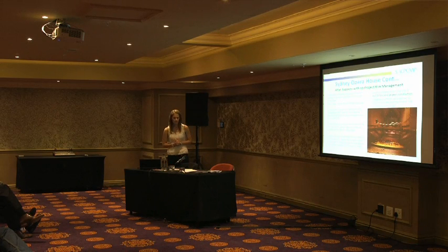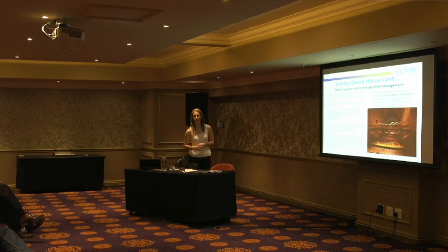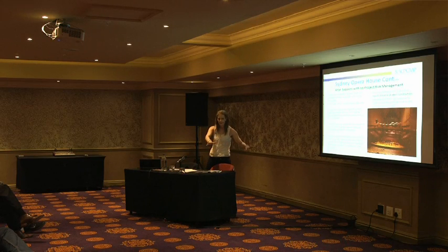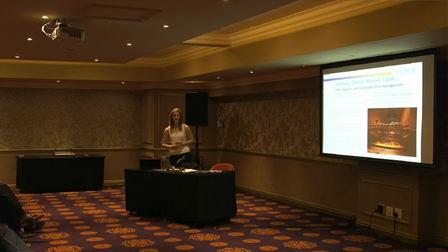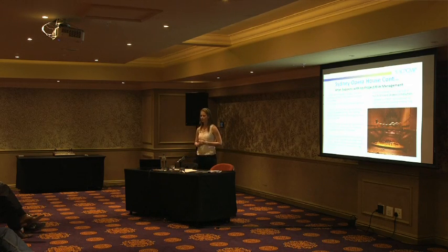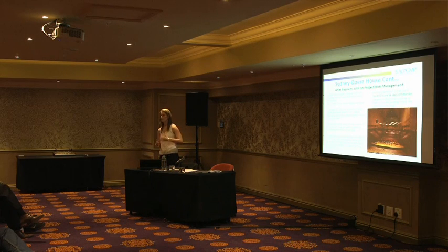Of course, the new engineers, architects, they would want to do a validation. They want to say, well, what do all the plans look like? What's been issued? To what have we constructed? They'll do their own little validation, and then only will they carry on. Now, they say this validation depends on the size of the project. Usually takes 4 to 12 months. So you can just smack that onto your schedule because that engineer probably won't continue issuing any drawings unless he's done his validation, he feels comfortable with where they're at and where he needs to continue from.